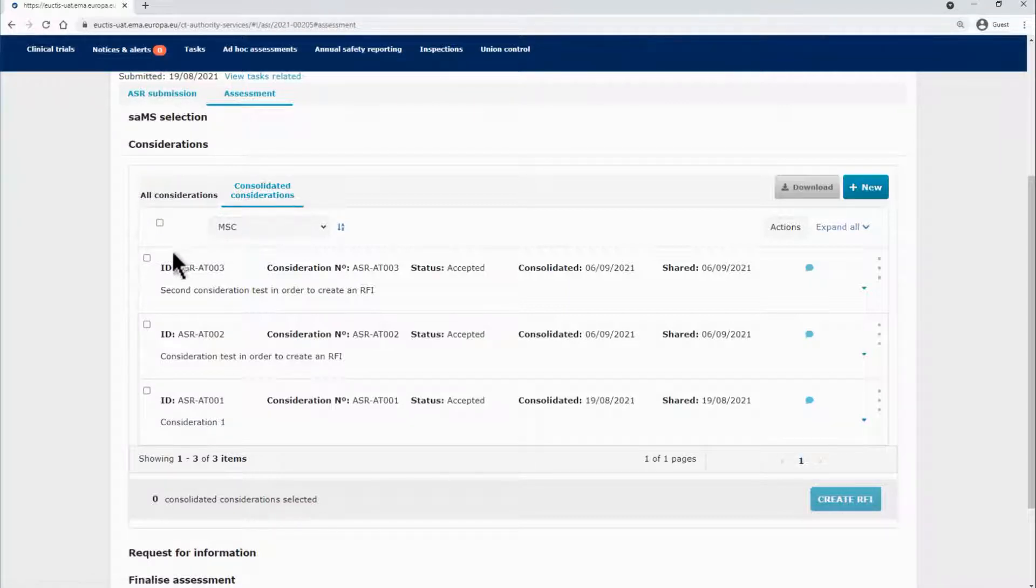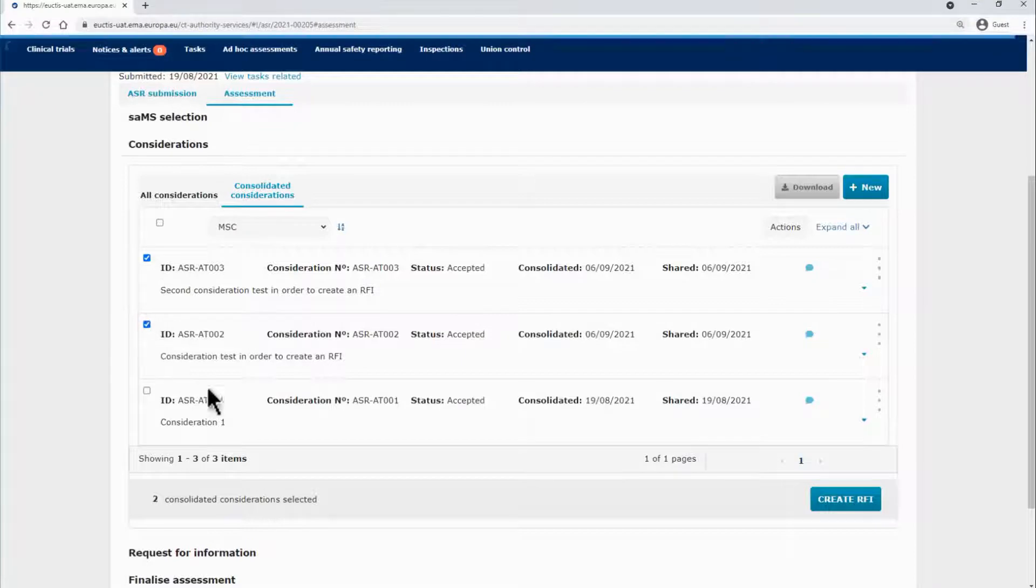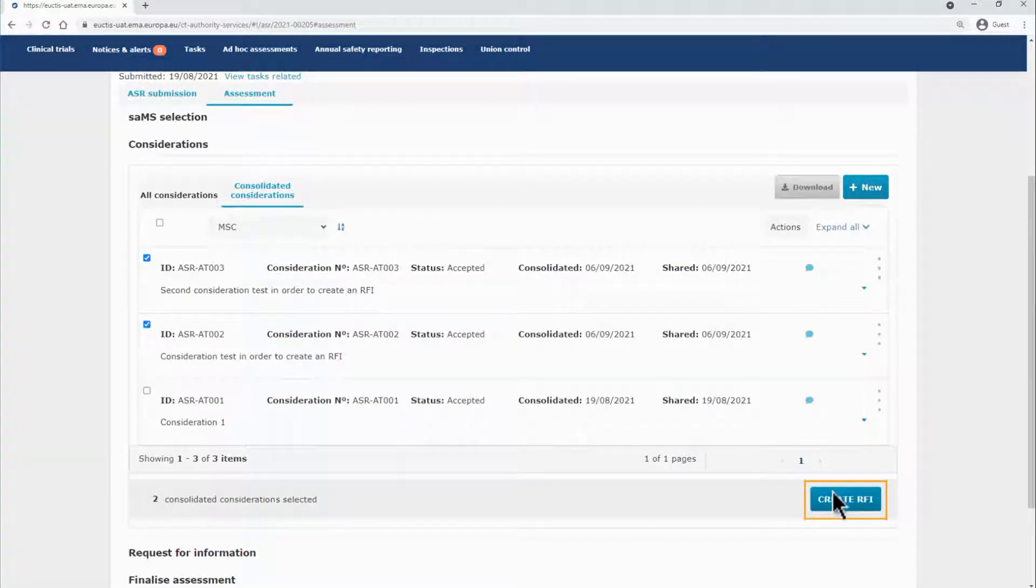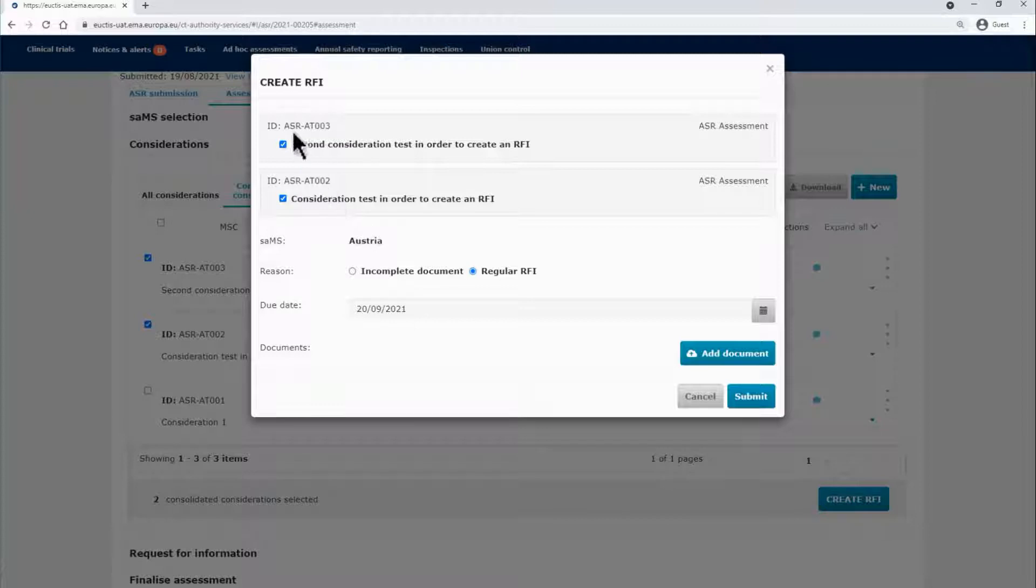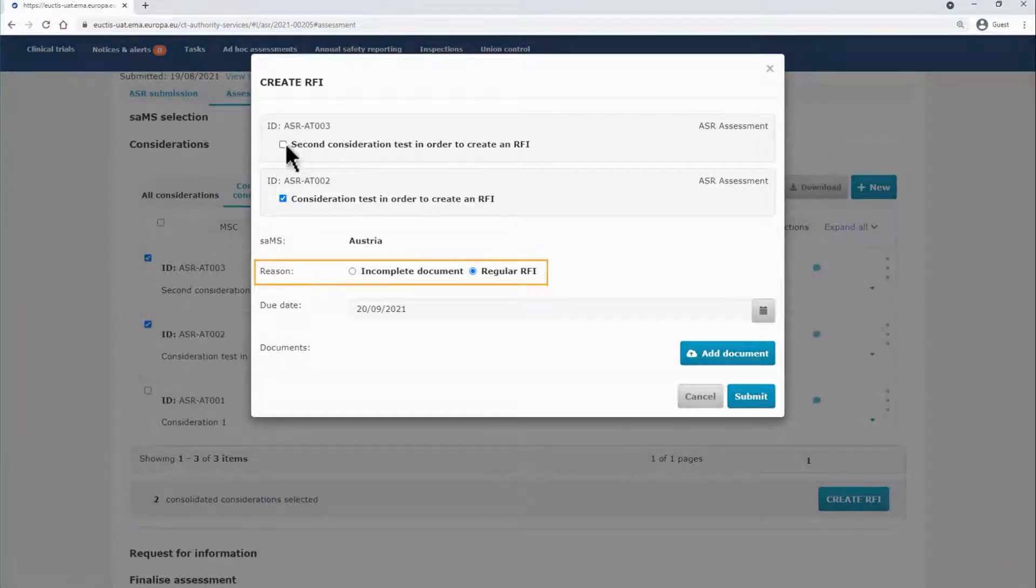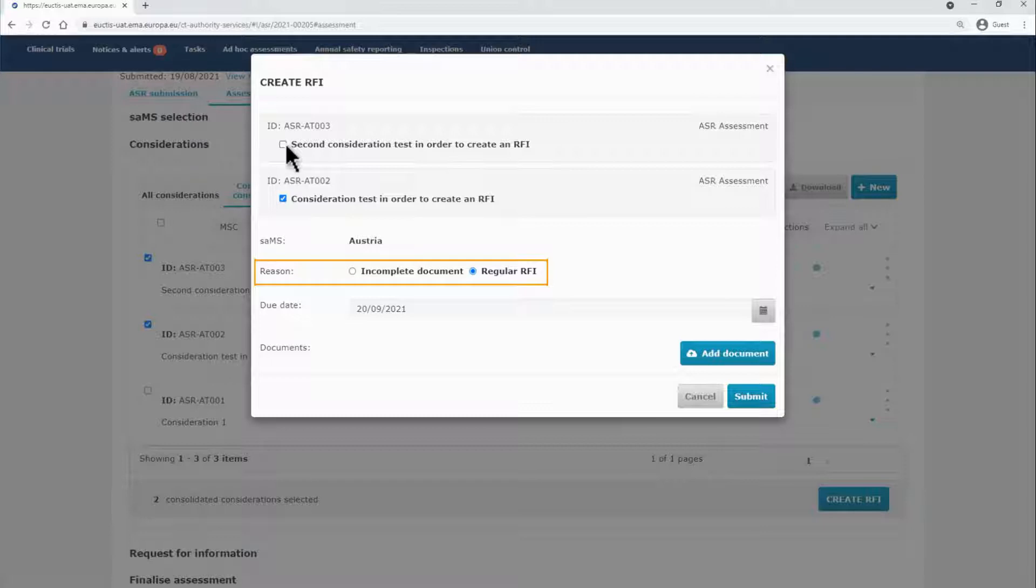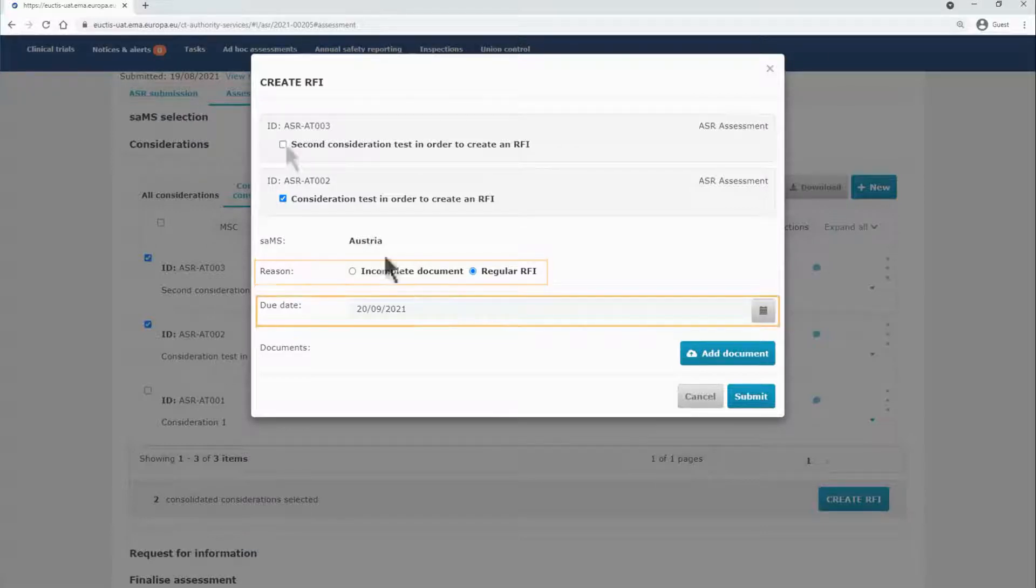The SAMS can select the related considerations and click on the Create RFI button. In the pop-up form, you can select the considerations using the tick in boxes on the left side. You can fill in the reason in the respective field, selecting whether there is an incomplete document or it is a regular RFI, as well as the due date.